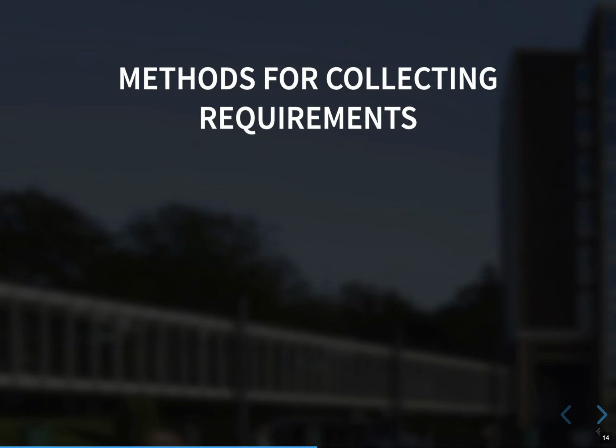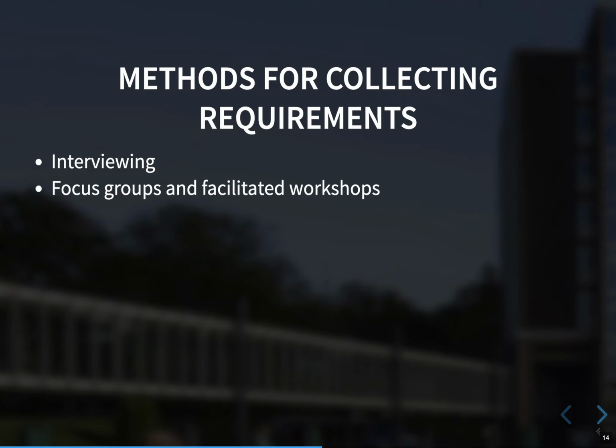What are the methods for collecting the requirements? Interviewing. So interviews with customers and stakeholders, those who are probably involved in the service or product you create or deliver. You create focus groups or facilitated workshops. For specific topics, it is helpful to have workshops. People who are responsible for a specific domain or are experts should be involved in these workshops.